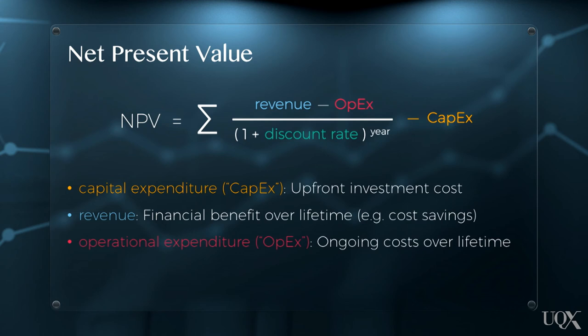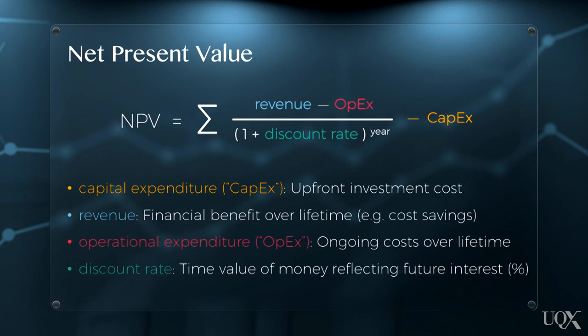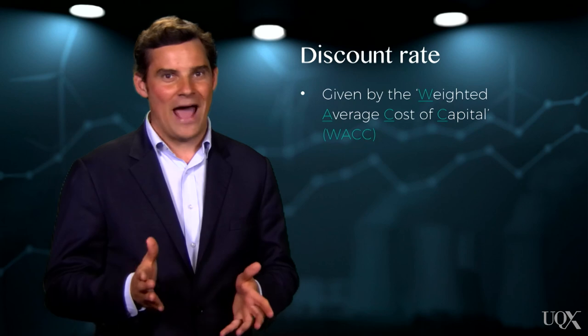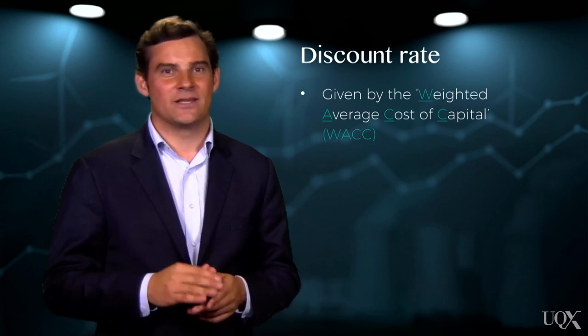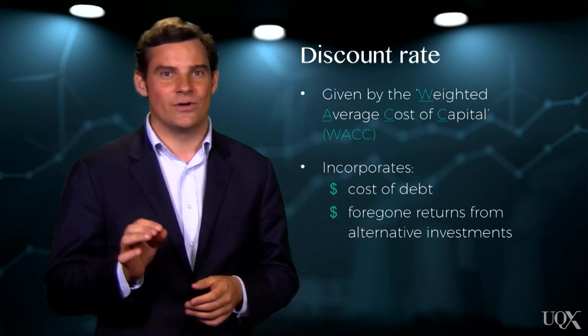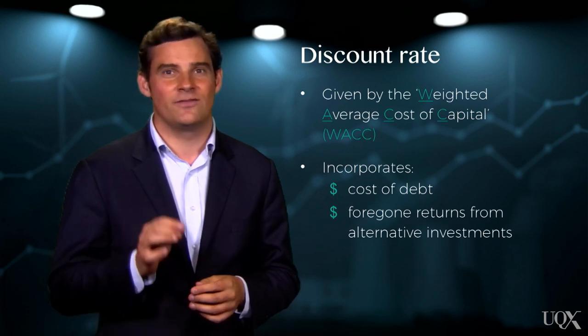Operational expenditure, or OPEX, is the ongoing cost of the project over its lifetime. For a solar PV project, OPEX may include the annual cost of cleaning solar panels to ensure efficiency is maximised. And finally, discount rate reflects the time value of money when that money is borrowed. In our earlier example, this was 2%. Discount rate is given by the weighted average cost of capital, or WACC. This principle incorporates the cost of debt – for example, a loan from a bank – as well as the cost of equity, that is, the foregone returns that could have been achieved from alternative investments.